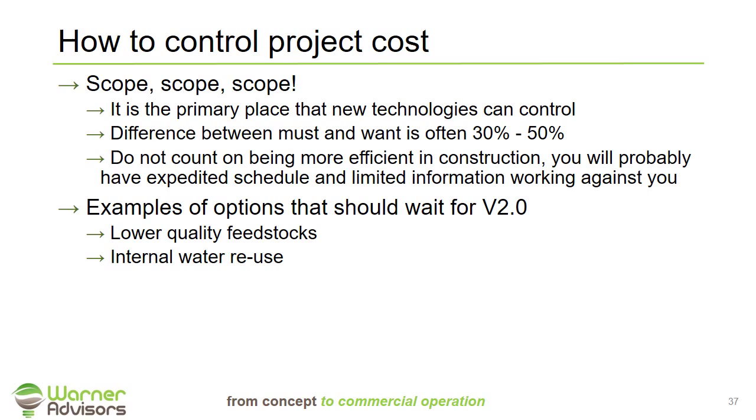Again, it's obviously going to be great to reuse as much water as you can. Take some of that wastewater, clean it up, maybe use it back in your fermentation. That can be both capital intensive and complex, and worry about recycle of different contaminants and things that'll cause complexity, again, I think should wait for the second version of the plant.